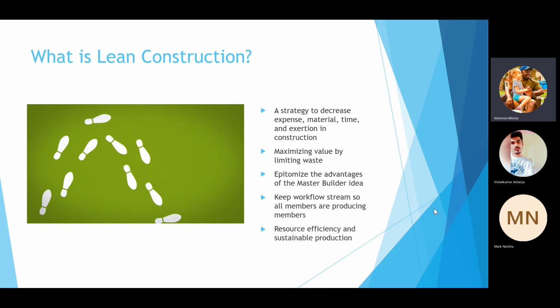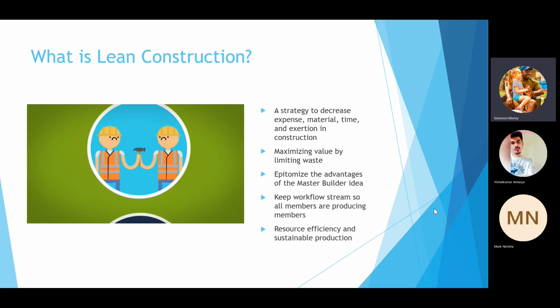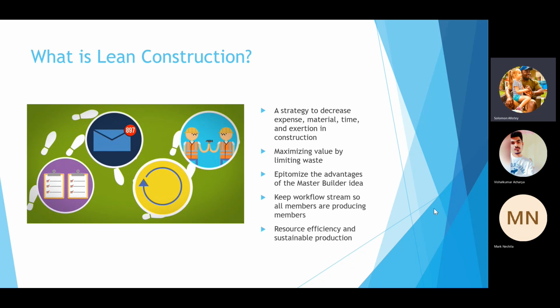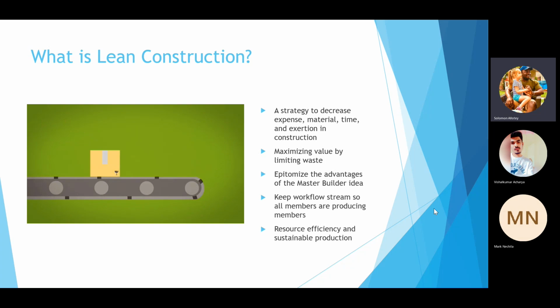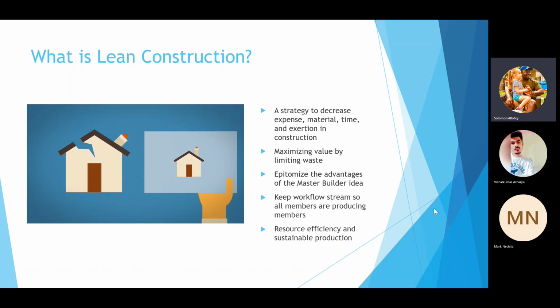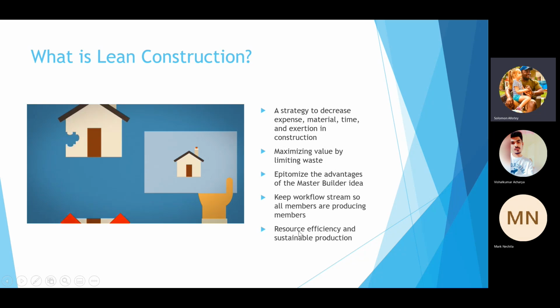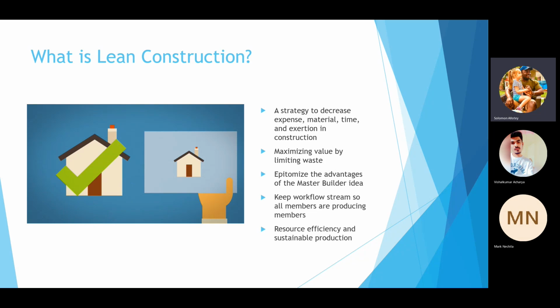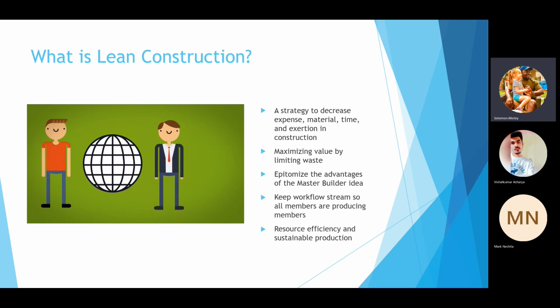Over-processing: unnecessary steps in operations, such as reprocessing, double handling, added communication, and double checking, which adds no value. Overprocessing is often inserted into a process as a result of dealing with defects, overproduction, or excess inventory. Overproduction is producing more than is needed, faster than is needed, or before it is needed. This results in excess inventory carrying costs. Defects: products, materials, or services that do not meet expectation or conform to specification. Corrections and defects are anything not done correctly the first time and must be repaired, sorted, remade, or redone, as well as materials which are scrapped due to defects.